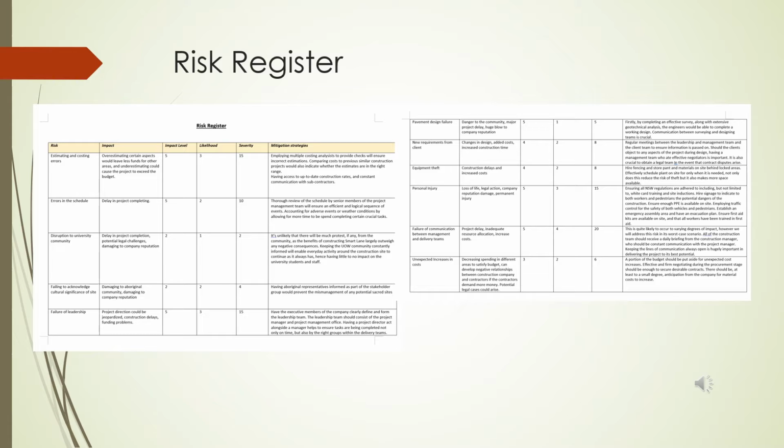Next comes the analysis of the risk. We use a risk rating matrix to assess the severity of each risk, and then we compile all this data into a risk register. The risk register is always reviewed constantly throughout the project, which is step 3, review and monitoring of risks. Since risks change throughout the project as the nature of the project evolves, it's crucial that they constantly be reviewed, as some become more relevant and some become more irrelevant depending on the time and scale of the project.